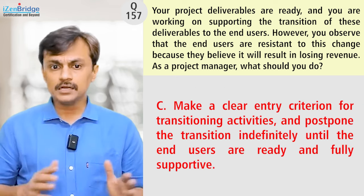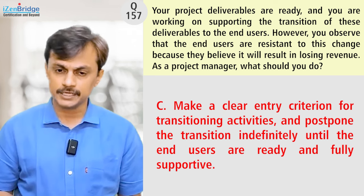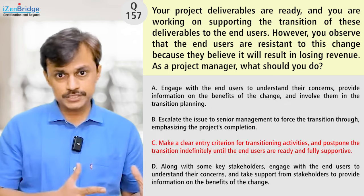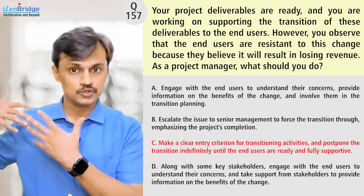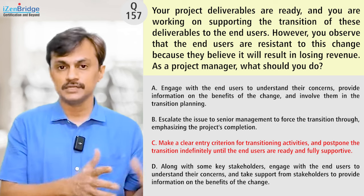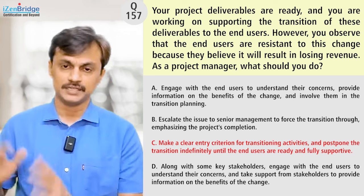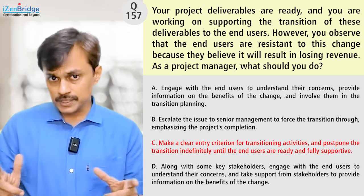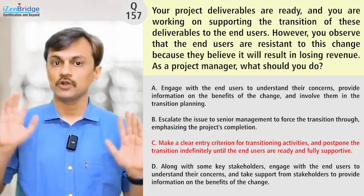Option C: make a clear entry criteria for transitioning activities and postpone the transitioning indefinitely until the end users are ready and fully supportive. In practical, in a contractual situation, sometimes you end up doing this. If supporting the transition is not part of your project contract, your focus may be producing the deliverable and giving the client a time window to choose when to implement it. But in this question, we are not getting that situation clearly, so we should not assume it's a contractual obligation.